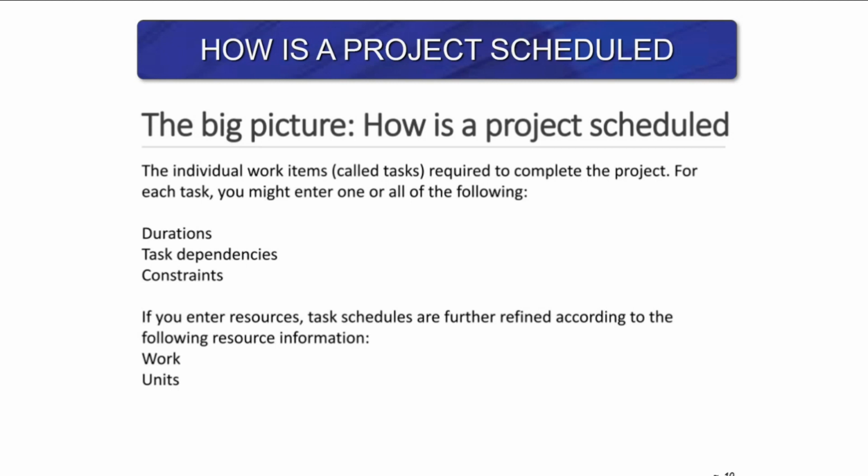But for each task, you might want to know specific features. Many bigger projects would involve hundreds, even thousands of tasks. But for each one, with planning and estimation, they need to be relatively clear: the duration, the content, the resource constraints, and task dependency. Okay, other tasks would depend on this task.